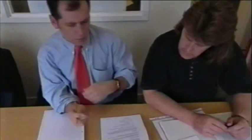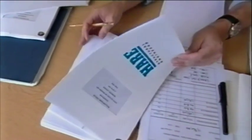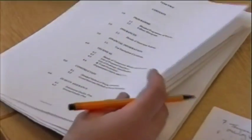The one in the 5 million range from Hare's, I'd suspect at this stage, without knowing, I suspect they must have made some qualifications or omitted something. I can't believe that they'd be that far different from the mid-range.